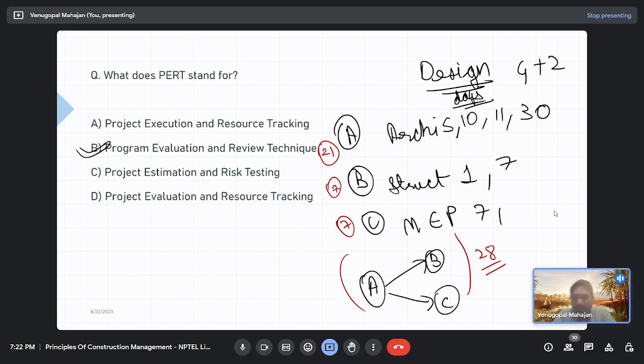There are so many parts in a missile, so many new theorems, or even so many new designs they had to come up with, and they couldn't put a fixed timeline, right? Overall, let's say the US government gave them 5 years to complete the missile, and there were like 20 stages. For each stage, either I can get a result in 1 day itself, or by going iterative it can take 1 year itself. So they had no way of planning for it or quantifying it. This was converting the probabilistic durations into a deterministic structure. So that gave the start for PERT.